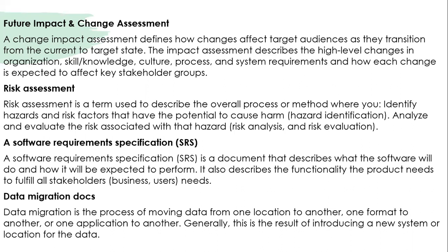Now we have data migration documents. We have the data migration processes that happen in the realize phase. In the initial phase, there is a need to get legacy information or data from the client. They can be your master data, customer master data, vendor master data, GL master data, chart of accounts, balances, bank statements, balances brought forward from previous years, the balance sheet balances, audited reports, and so on.